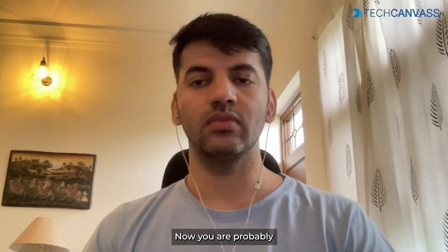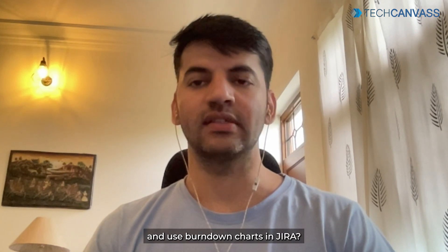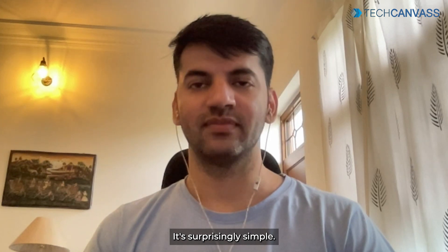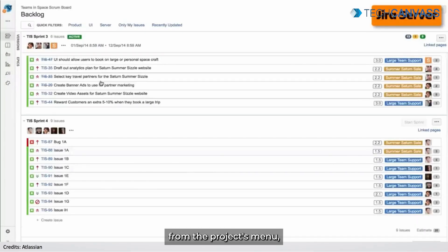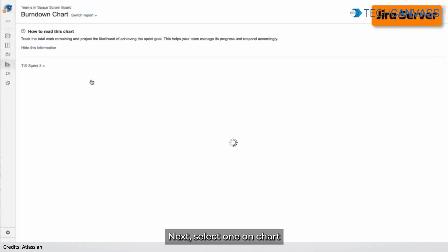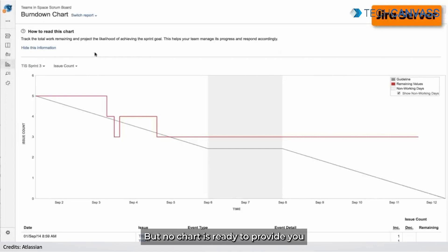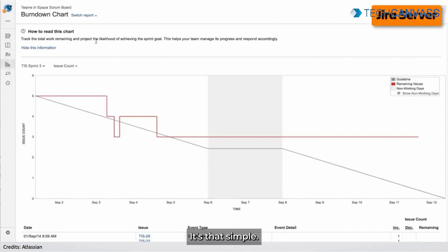Now you are probably wondering how to access and use burn down charts in Jira. It's surprisingly simple. First, open your Jira project from the project's menu. Click on Reports. Next, select Burn Down Chart. And there you have it — your burn down chart is ready to provide you with valuable insights into your project's progress. It's that simple.